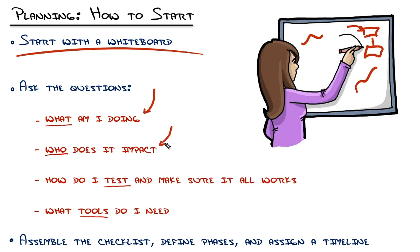So I'll ask myself the questions. What am I doing? Who does it impact? How do I test to make sure it's all working when I'm done? And what tools do I need? I can't tell you the number of times I get to a location and it's something trivial like, oh, I forgot a screwdriver or I forgot a screwdriver that has this size bit.